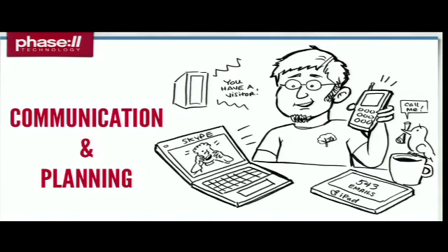The key is that you have some place in which people can actually have some transparency and some visibility into what tasks everybody in the team is working on, and that helps a lot with the communication amongst the team, because people tend to understand when someone else is swamped or busier better when they can see a backlog for them than just feeling like they're picking up on their stress or something like that. So communications and planning, probably the most important aspect up front. Communications plans, tools, and team agreement on how you're going to communicate with each other.